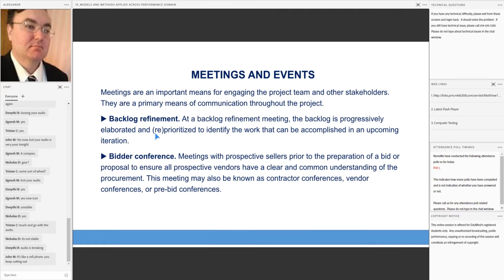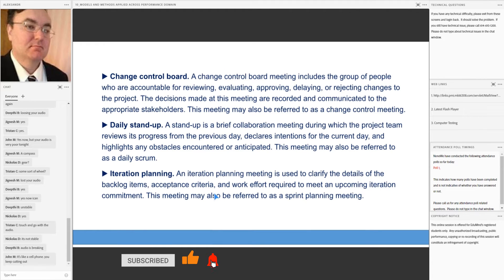Bidder conferences are meetings with prospective sellers prior to the preparation of a bid or proposal, to ensure all prospective vendors have a clear and common understanding of the procurement. This meeting may also be known as a contractor conference, vendor conference, or pre-bid conference.